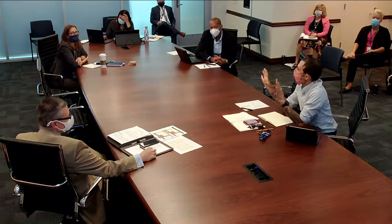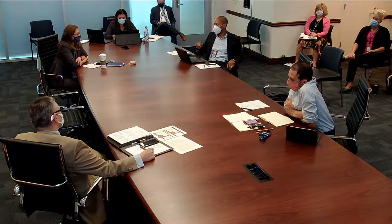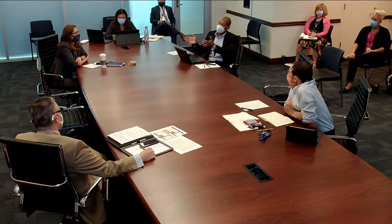Right. We have a little bit of time to evaluate, but I think Seth's point is you don't have forever. You can't decide you want to build a garage in 2023 and then start it in 2022. The issue is it's really 4 years to deliver it. Say for the next 4 or 5 years everyone's driving and parking, so let's build a garage. Then you've got 3 or 4 more years after that, because you still have to deliver the garage.